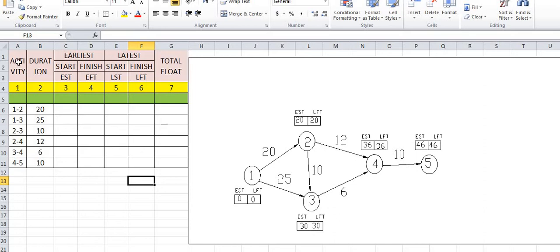So in answers also we have to draw this complete table depending upon which things are to be calculated. Okay. So in this network diagram, which things have we calculated? We have calculated EST, that is earliest start time, and latest finish time. So we will feed the data depending upon this. That means these 2 columns we have calculated, earliest start time and latest finish time. So first we will feed the data as earliest start time.